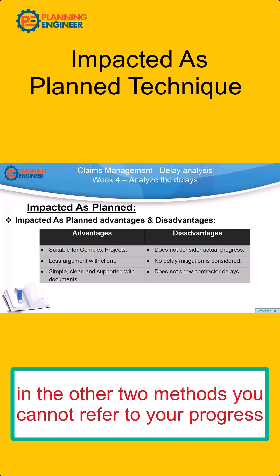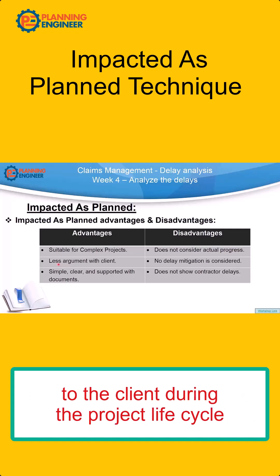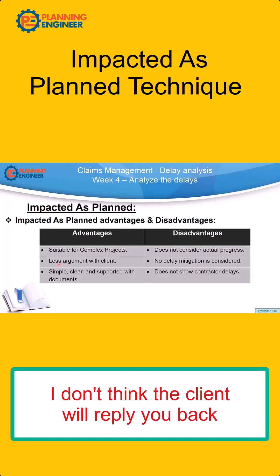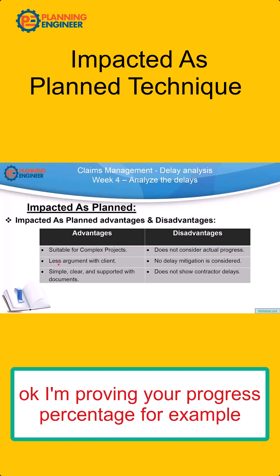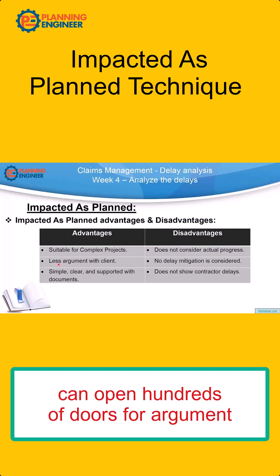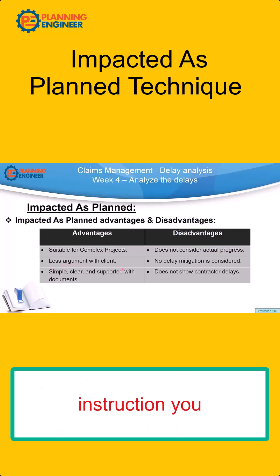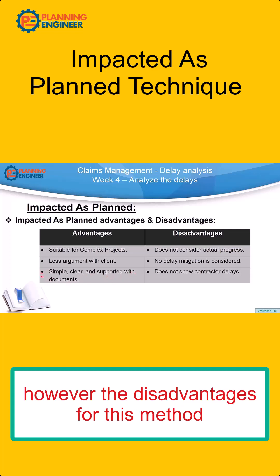The events are based on official correspondences between you and the client, so everything here has a reference. In the other two methods, you cannot refer to your progress because your progress is not an official document. If you submitted progress during the project lifecycle, the client could argue — for example, saying you finished only 40% of an activity instead of 50%. This opens hundreds of doors for argument. So, Impacted as Planned is simple, clear, and supported with documents.